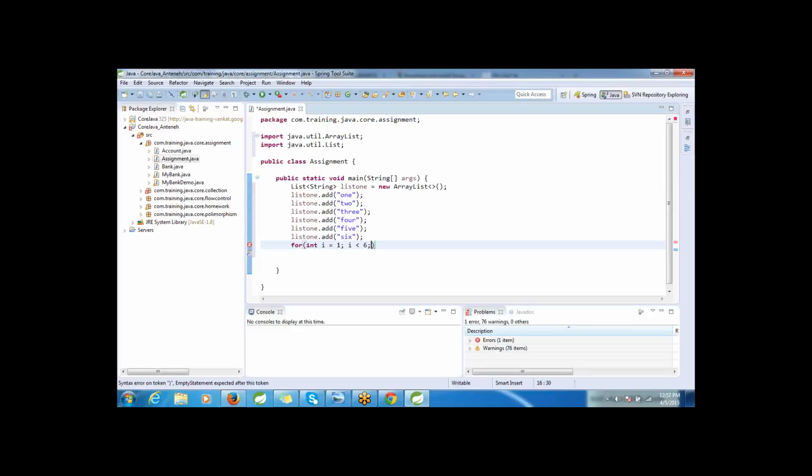Basically, daily stand-ups are meant for this: whatever task we have done today. Every day we allocate some hours for a task. For this list completion, for this code to write, we'll allocate like 8 hours of burn down, 8 hours of time allocation. Within these 8 hours, you have to complete this code because you have estimated that you will be completing this code in 8 hours.